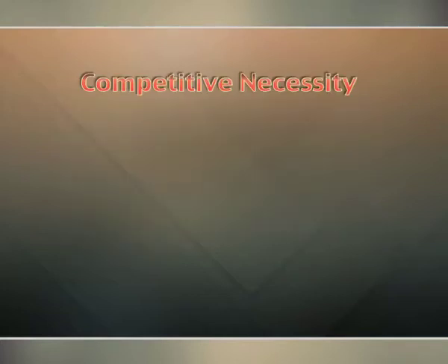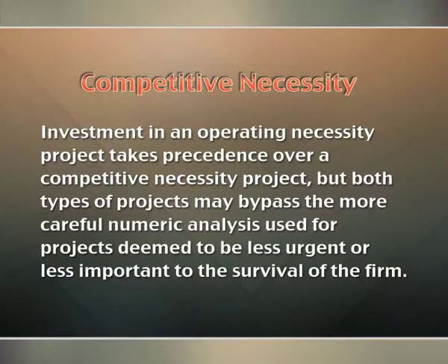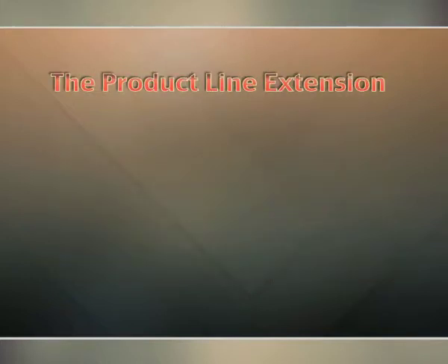Competitive necessity. Investment in an operating necessity project takes precedence over the competitive necessity project, but both types of projects may bypass the more careful numeric analysis used for projects deemed to be less urgent or less important to the survival of the firm. The next is the product line extension.